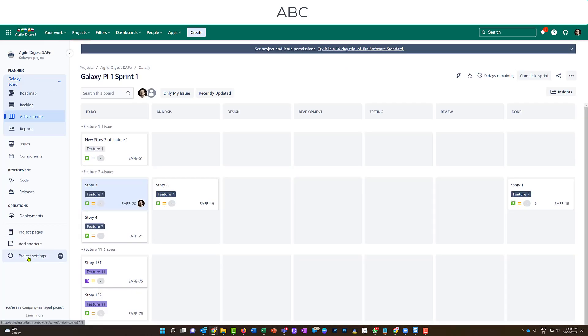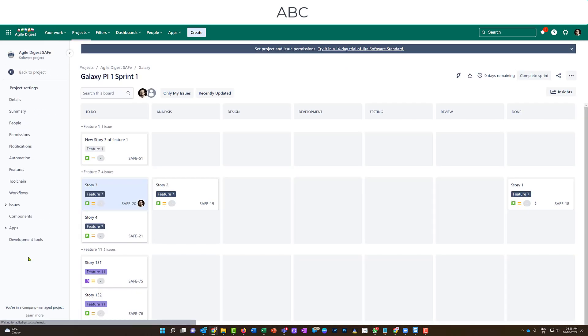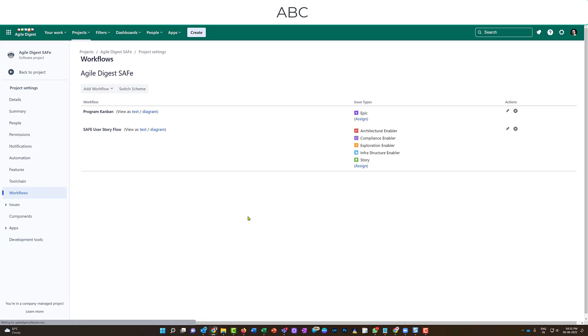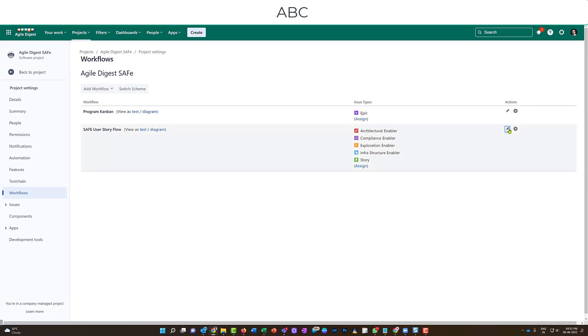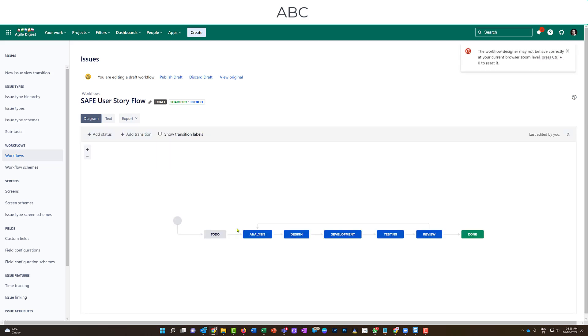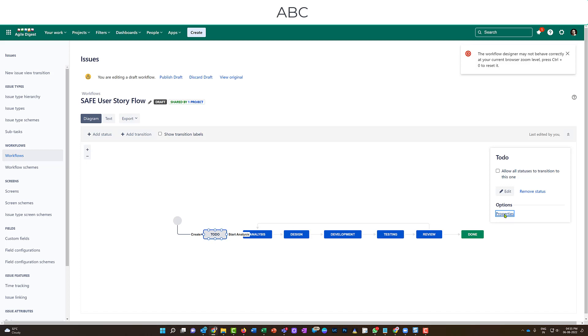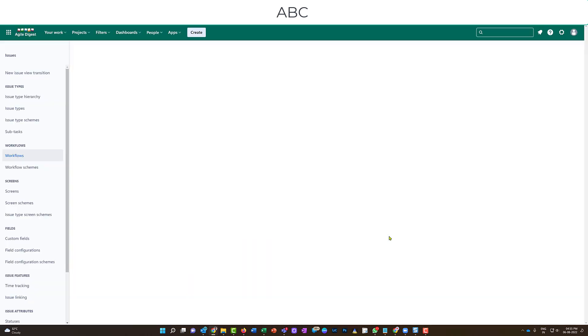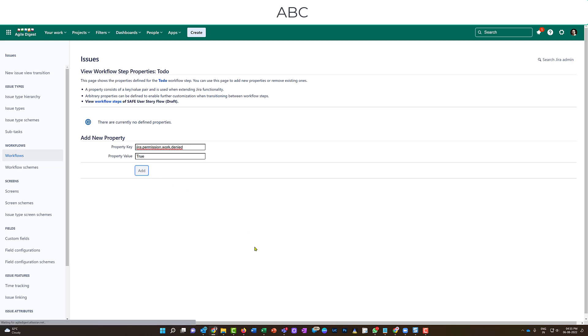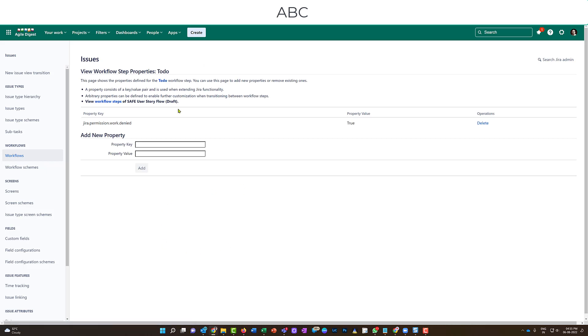So what I'll be doing again, I will go back to my workflow. How can I go there? I'll click on the project settings, go into workflows. Over here, this is the story. I'll click on this and edit. Now this time I will be adding it for to do. If it is in to do, I should not be able to log work. So I'll click on properties, add the property value as jira.permission.work.denied, and I will add a property value as true.